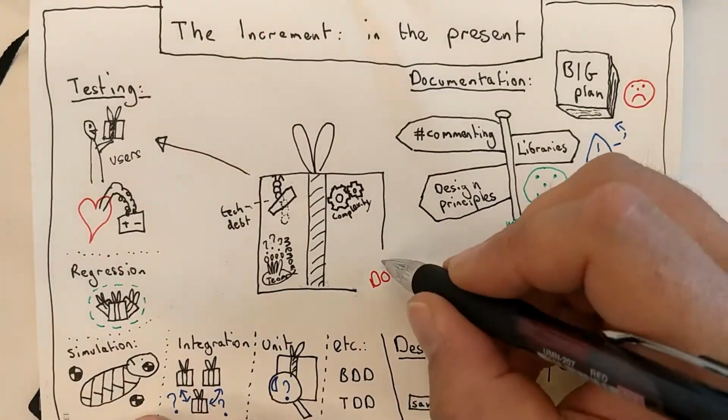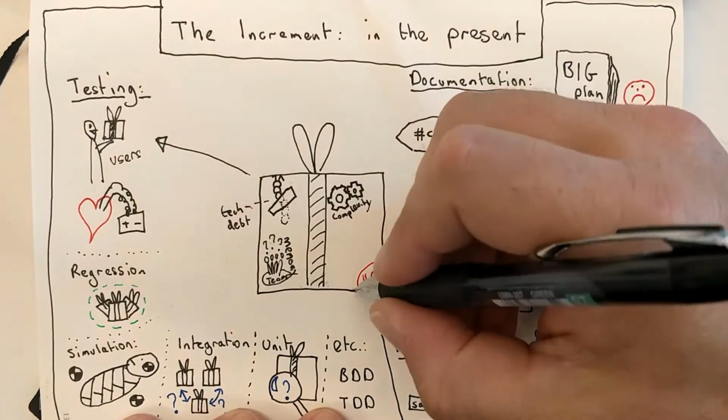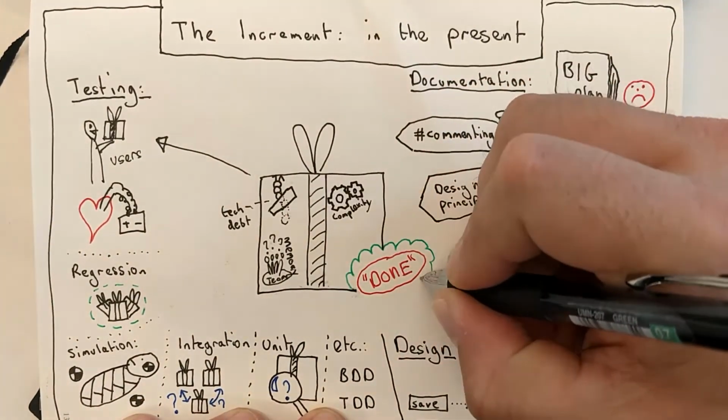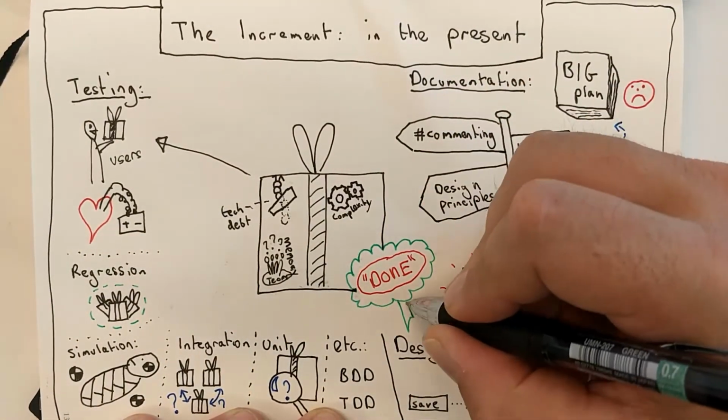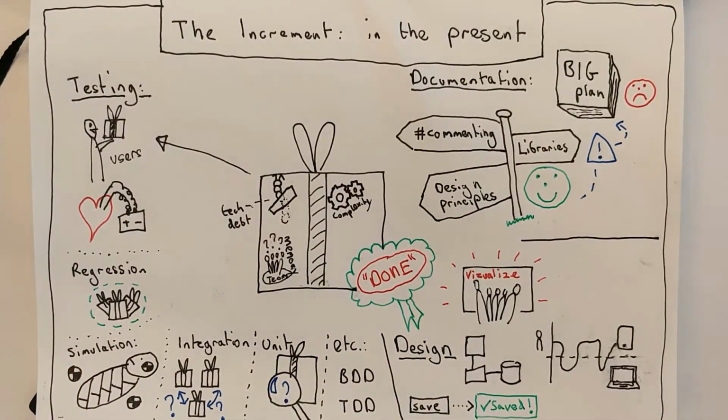This is what makes done such an important concept. It is the agreement between the development team, the product owner, and the stakeholders and customers about what can be expected of the increment. All of the previous items would be things to include in a definition of done.